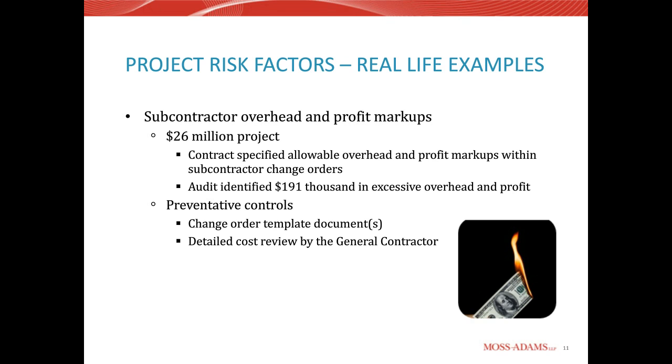You want your general contractor to review, or if you yourself as an owner have someone who's responsible for reviewing payment applications or change orders, you want a detailed review to be conducted so that you can catch these types of unallowable costs before they've been billed and before they've been paid. It's a lot harder to recoup any money after dollars have been paid out.